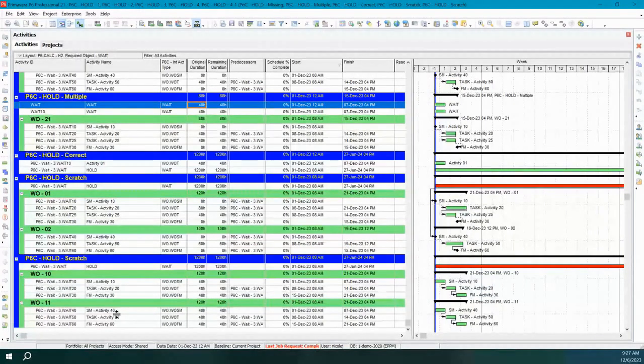Whenever we're working with Calculator, the first thing we do is see if you can do it in global change. But once our client has Calculator, then yes, we might jump into using Calculator just because it's easier, first of all. You don't have to remember to run it. The other thing you have to be very careful with global change is it works on what's on your screen. So if I'm in a layout that's filtered, I'm not getting all the data. You have to be very careful that you are running them properly, in a proper layout.